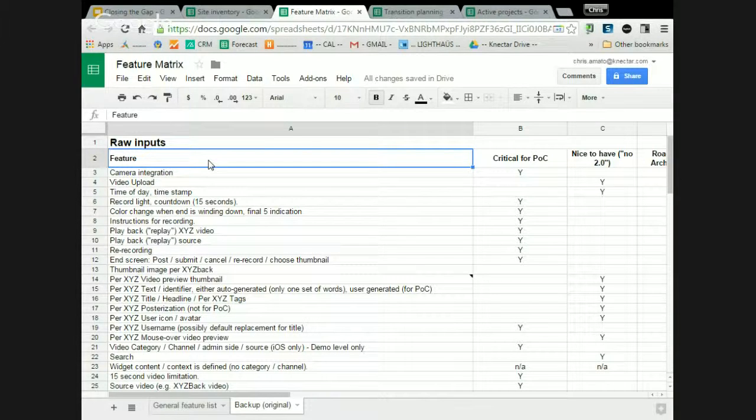You maybe want to do a more agile approach or a lean approach where you test fewer features earlier and add features as you actually get information from users, not just from your predictive imagination. Very interesting question. A lot of strategy goes into that kind of thinking. And then there's probably one other category, which is, this isn't even feasible using current day technology. So determining what category each of these feature ideas falls into is really critical, because you need to ultimately say, here's what we're doing and here's what we're holding off on. That's a really key thing. And here are the resources involved and the cascade of questions that come out from that.